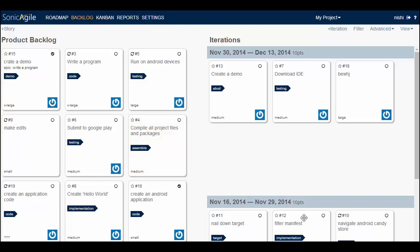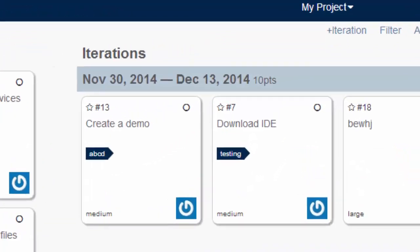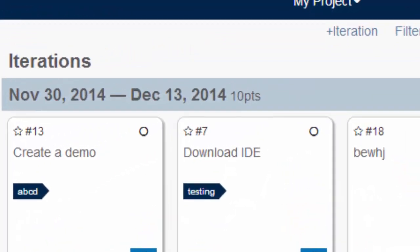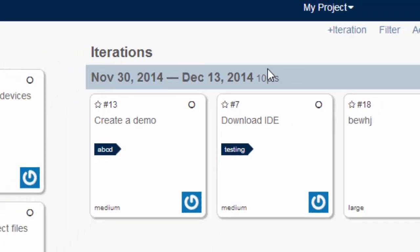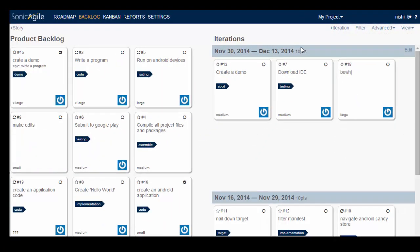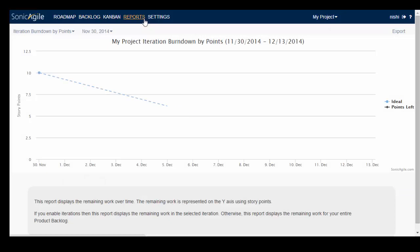If you enable both Agile Estimation and Iterations then you can track your team's velocity. Each iteration as you can see here will display the total number of story points completed in the iteration. Finally, if you enable Agile Estimation then you can view your Burn Down Chart that represents your team progress. A Burn Down Chart displays the amount of work remaining over time.